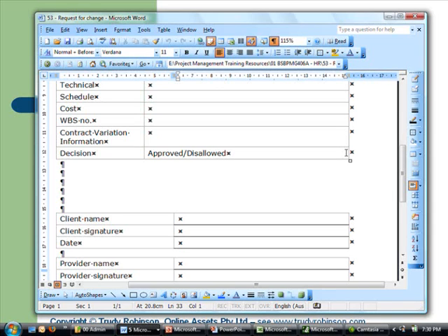If it's going to cost something, that would go up to the project manager and go to... You are the project manager. Well, if you take it the next step, that becomes a variation of the contract with cost most times. Yeah. So you tell your stakeholders, well, look, it's going to cost you something. That's right. So this will be the first step in a contract variation, yes.